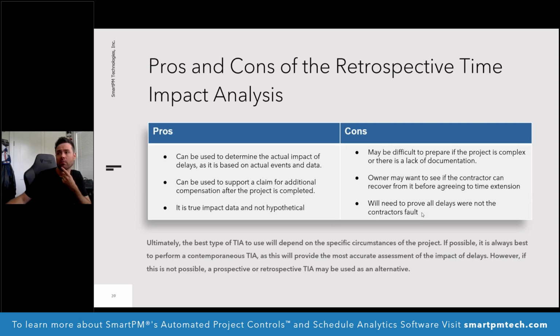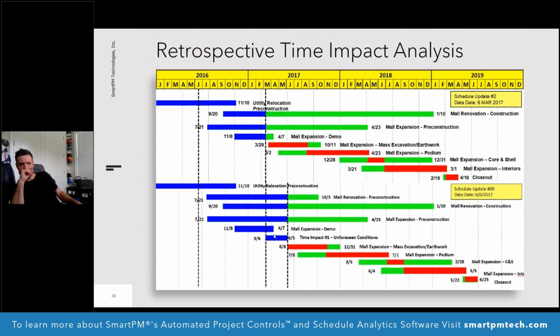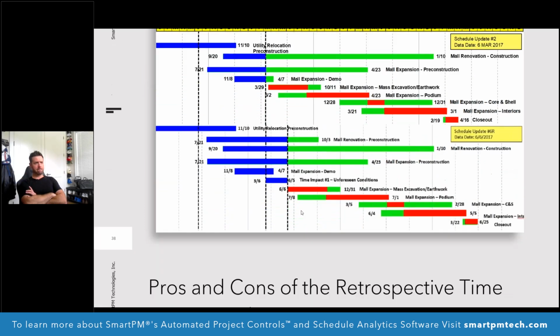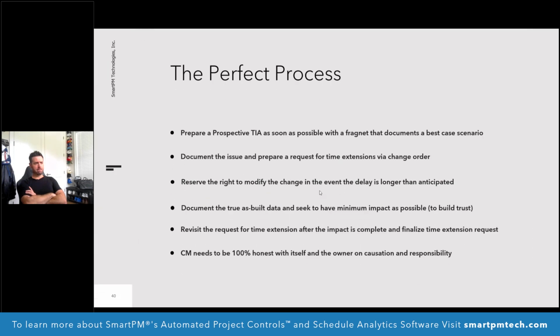because that's going to become the question. And that's something that you need to prove out through your correspondence, is that, yeah, well, we waited, and this is how long it took to get the material delivered, and this is how long it took for an entire crew that we planned for to install it, and they were being as productive as possible, and then here's where it rained, and whatever it may be. You have to have that whole story buttoned up, and that's done through the correspondence. You can't just assume that, well, it took 3 months, so that's how long it took, and I didn't cause any problems there. You have to prove that out, because somebody's going to want to prove to you that maybe it could have been done better.